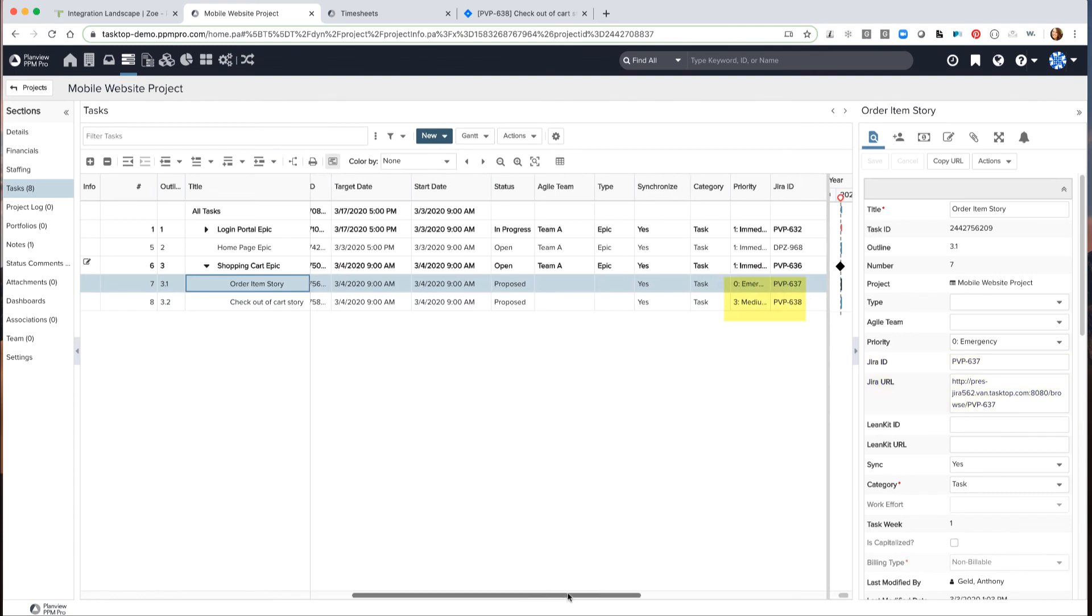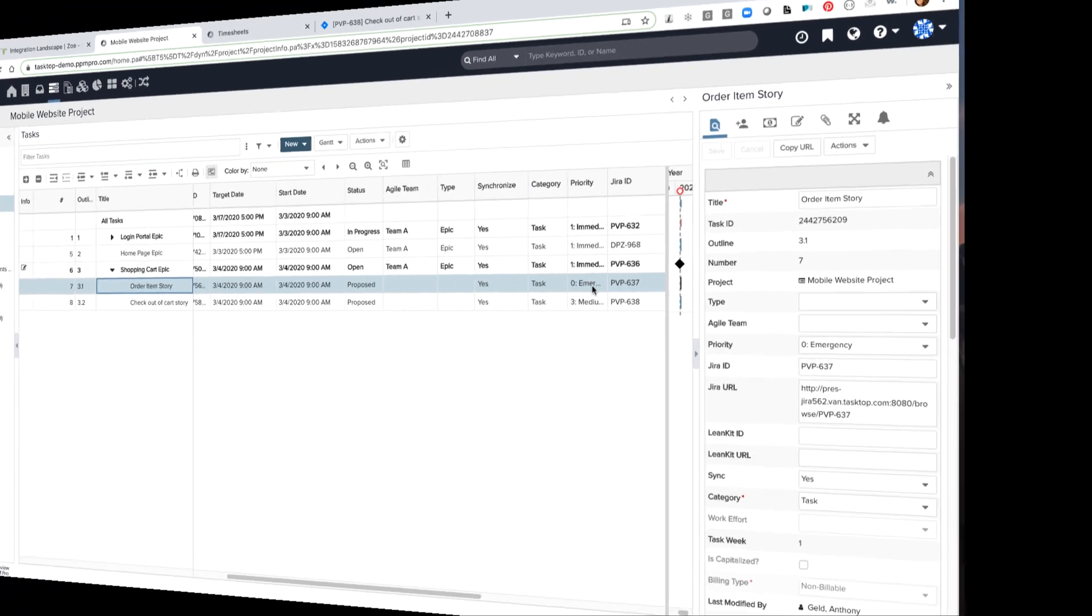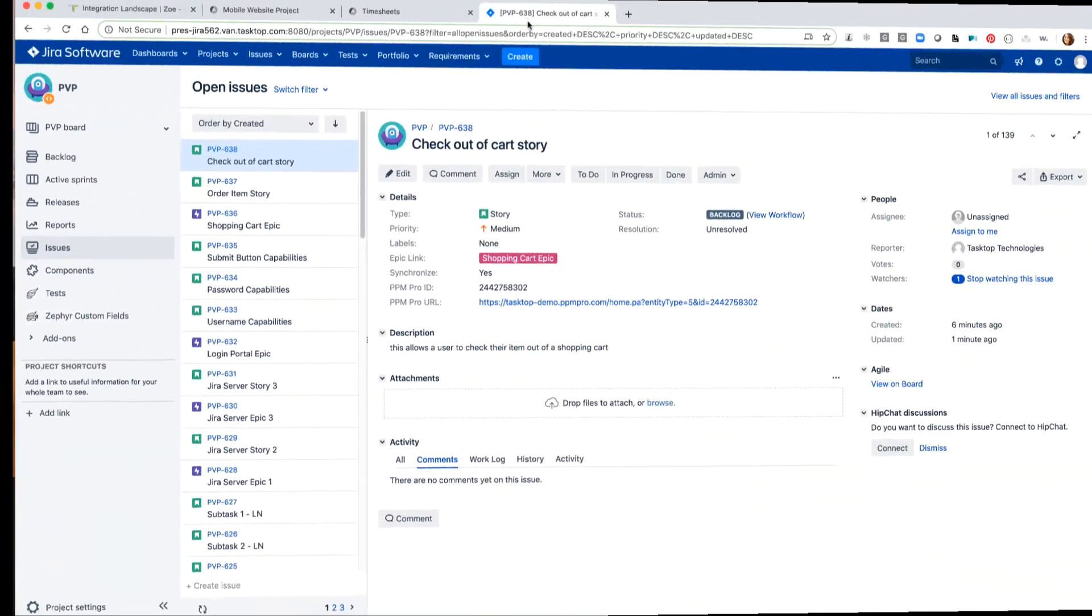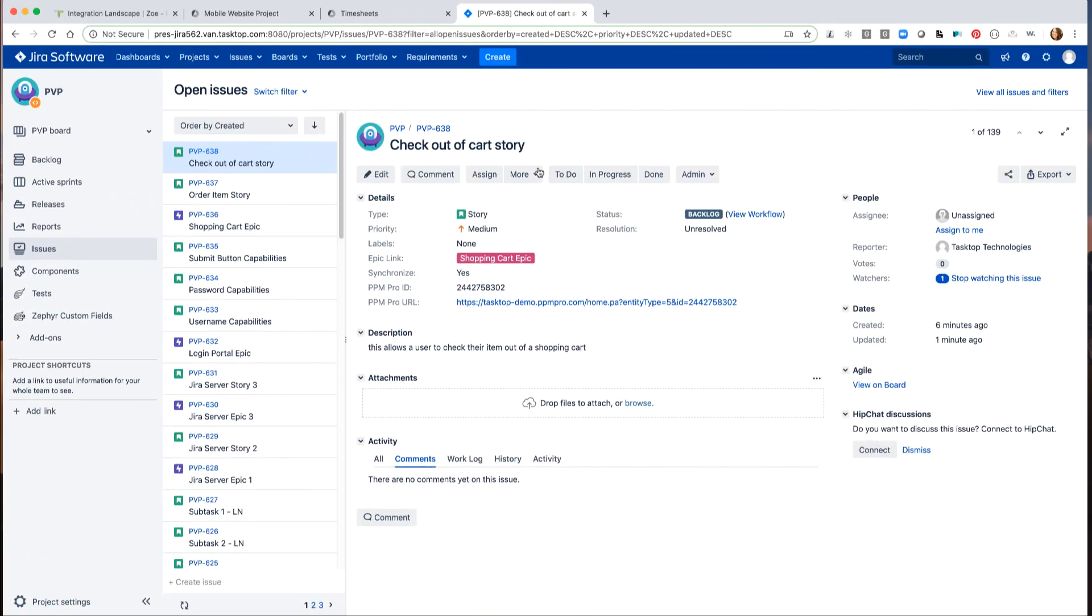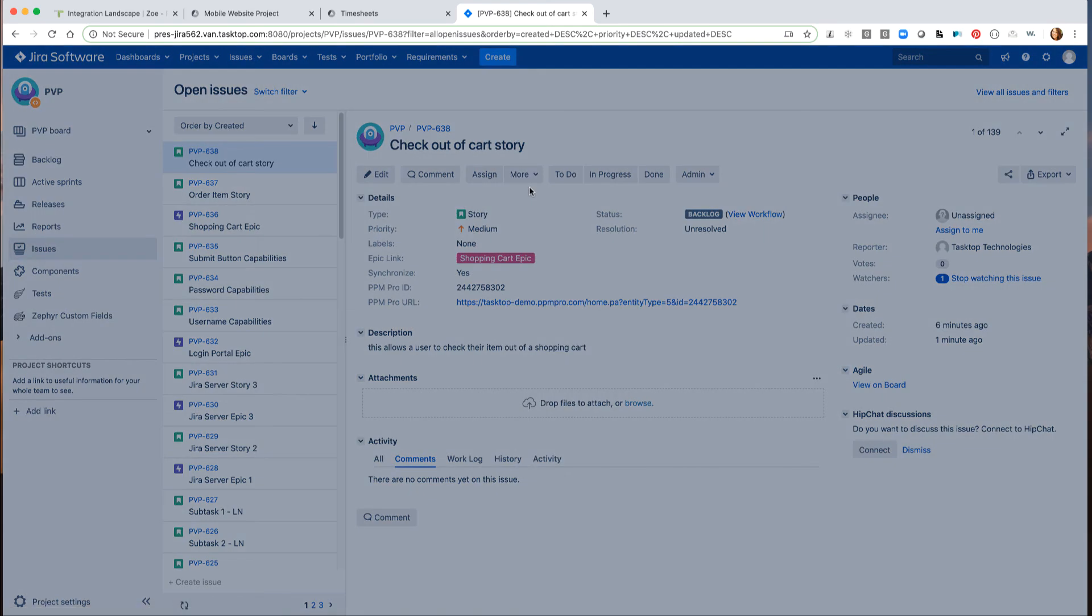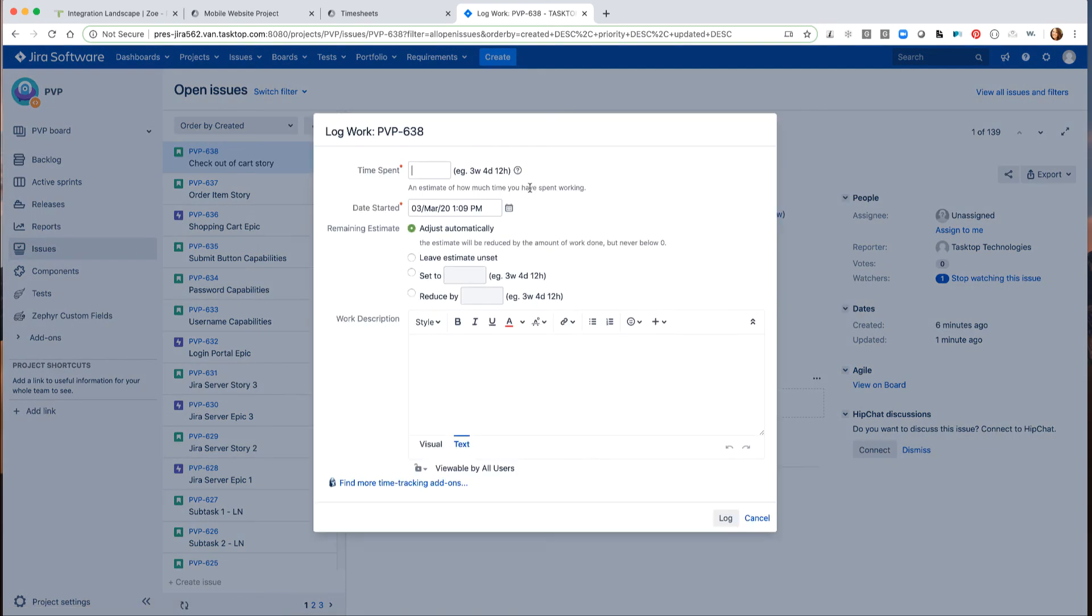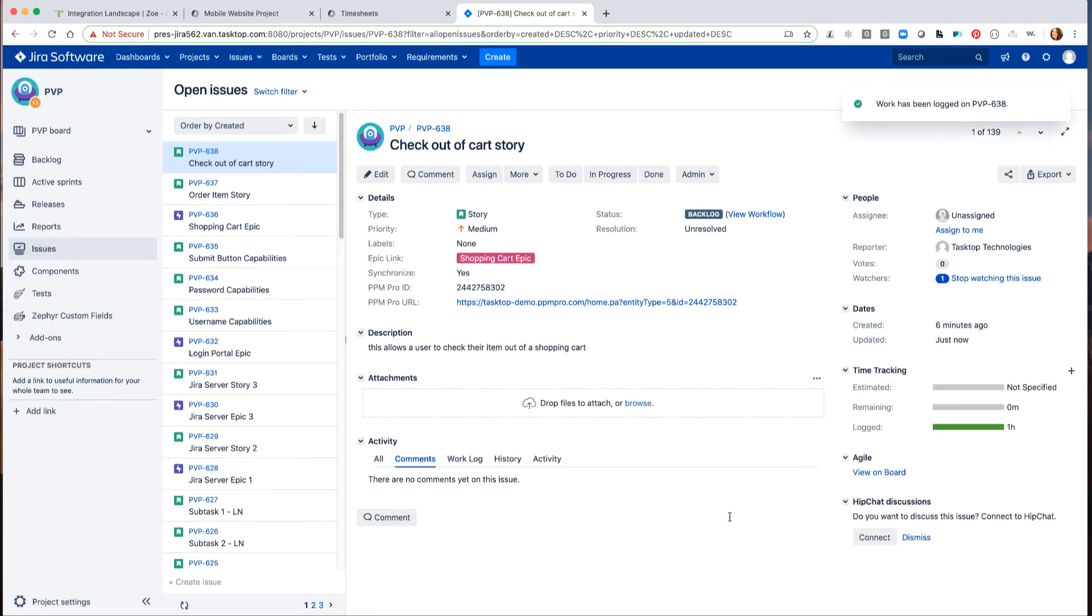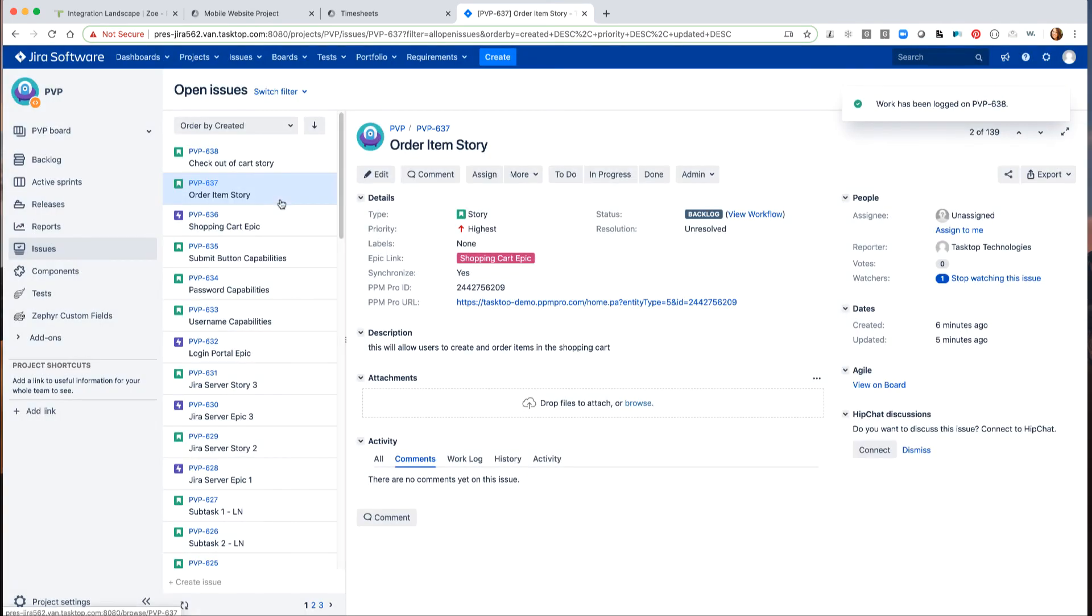Now, let's see how this integration works from Jira to PPM Pro when the project manager needs to see time logged in Jira for a shopping cart project. In Jira, the developer starts working on stories and logging the time spent on these stories. For the checkout of cart story, he logs one hour. And for the order item story, he logs two hours.